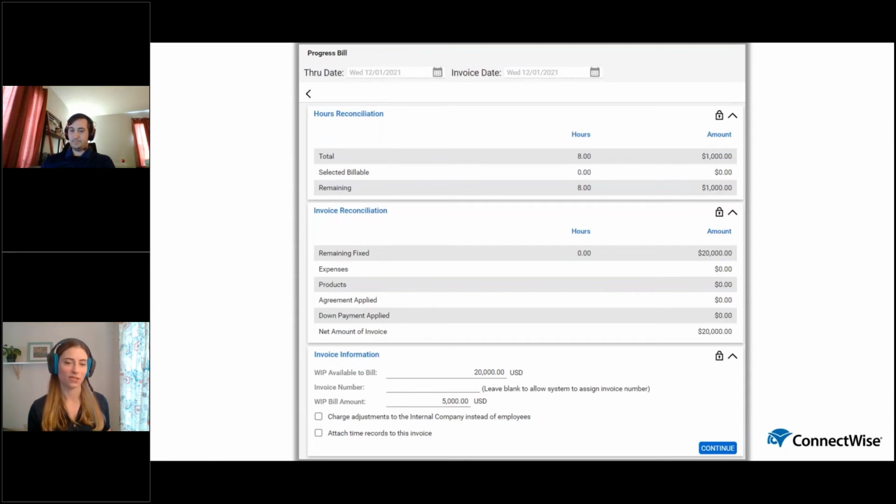Now this is where an agreement with a client that's trying to fit a larger scale project or a lot of work into their budgets for the year can be really handy, because I can go through and agree to them that they'll only pay maybe invoices of $2,500 quarterly, $5,000 monthly, whatever works for their budget, and bit by bit complete the payment for this project.